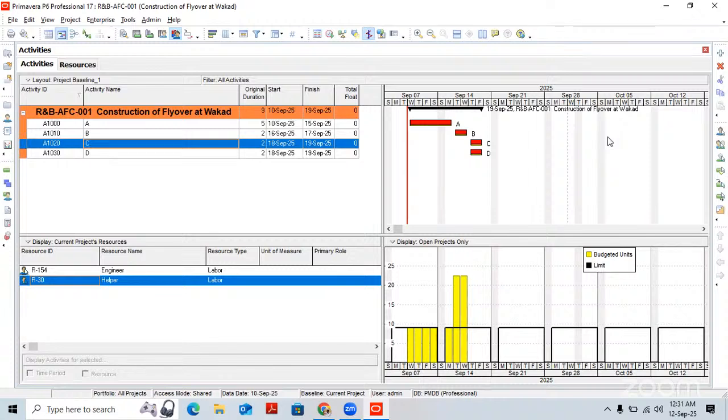No, critical path, EVM. No. The precedence diagram method, the PDM, when we are talking about critical paths. But Primavera does that automatically, right? That's when we add the column of float and total float, in order to see which activities are critical and then analyze it, looking at what's making it critical and how we can ensure that everything works out well.